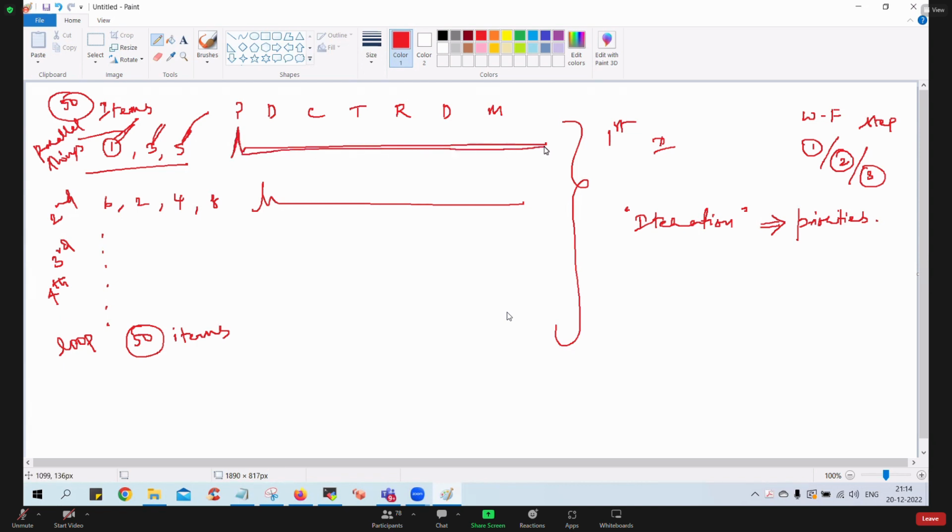So that means at the end of the first iteration, can I see the visibility of an application here? Tell me, guys. At least some part of the application. Some part. Like imagine a use case of house construction. Let's say I told the people to complete their first iteration. In the first iteration, maybe they've done the foundation work and some pillar work, right? That means I can see the visibility of my little. So we have to agree that the entire application may not be visible. That is true. But again, we have to agree that some part of the application is getting visibility there, or you can say it is getting activated.